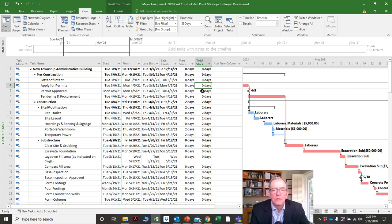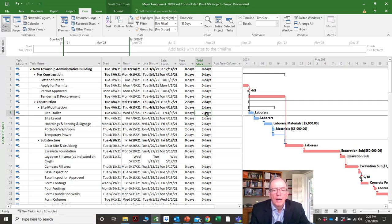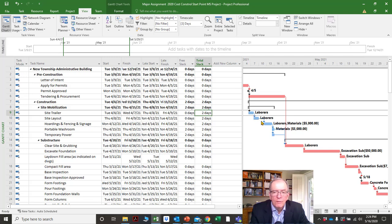It means how much flexibility you have in this activity. If there's no flexibility it will show zero days — zero days means no flexibility. If it says two days, that means this activity could take two days longer without changing the finish date.